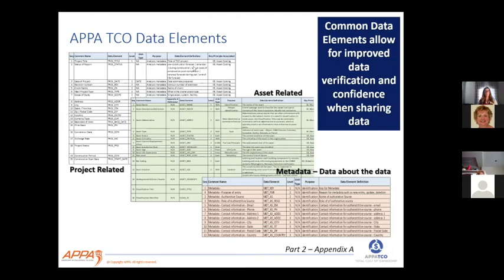So what ends up happening is the only way that that asset gets updated is at the end of the project. We have to make sure that that add delete log is updated and uploaded into Famous to now give that to our maintenance. Okay. What things are missing? What huge things are missing if those aren't joined? We eventually get it joined, but what is missing?